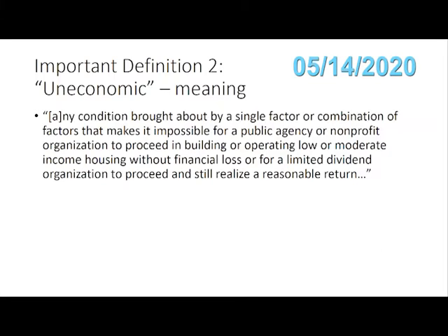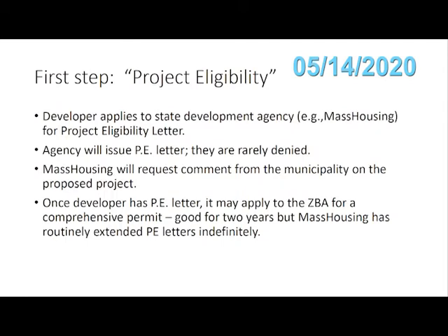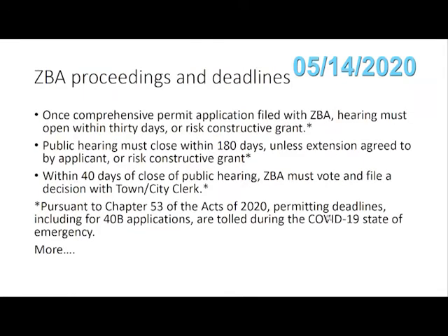Yes, it does. And I'll jump in because John's scope is not specific to this project. But yes, this site has wetlands. It is subject to the Concom review, and the wetland delineations have not been determined yet. The Conservation Commission, as people, especially direct abutters, would know, there was a filing earlier this year. There was a public hearing notice that went out that set a date for that to open. That did not open on that date because of the COVID-19. And so that is kind of indefinitely tabled.